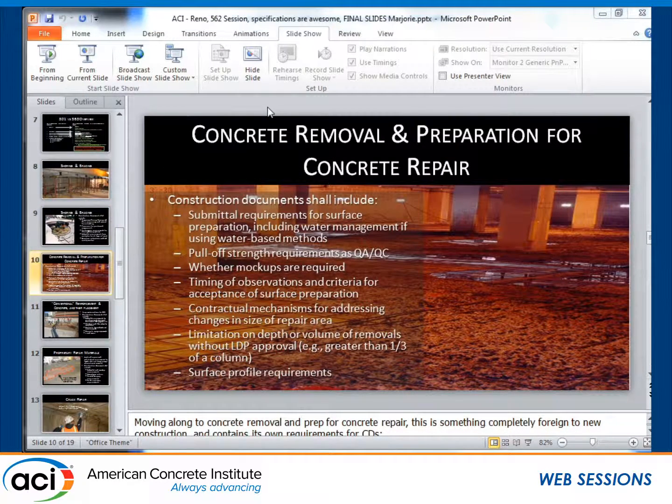And we have concrete, moving along to concrete removal and prep for concrete repair. This is sometimes pretty foreign to people who haven't done much work in repair. And there are different requirements in the CDs to do this kind of stuff. You need to have submittal requirements for surface prep, including water management if you're going to be using any kind of water demolition. Pull-off strength requirements is a QA/QC